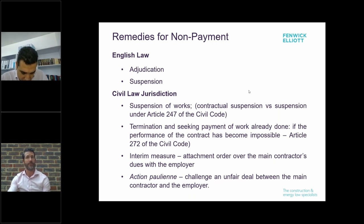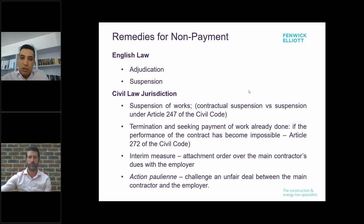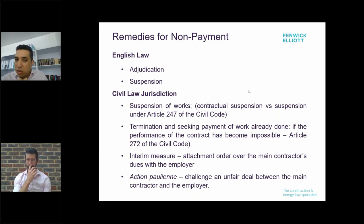Contractors in civil law jurisdictions therefore have to seek alternative self-help remedies to enforce payment. Suspension is a very strong and effective tool in case of non-payment, but we always advise clients to be careful exercising the right of suspension because the consequences of suspending construction projects can be very serious. Before exercising the right of suspension, a contractor or subcontractor must make sure they do it properly in compliance with the contract and the relevant provisions of the civil code. The party exercising suspension rights should be clear as to whether this is done under the contract or under Article 247 of the civil code.